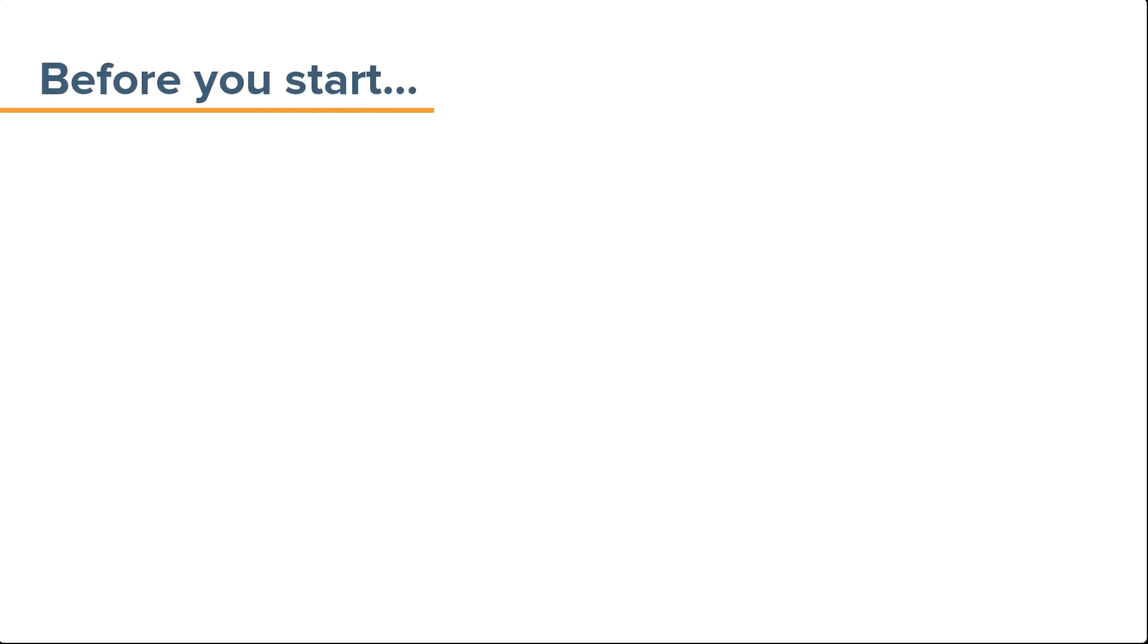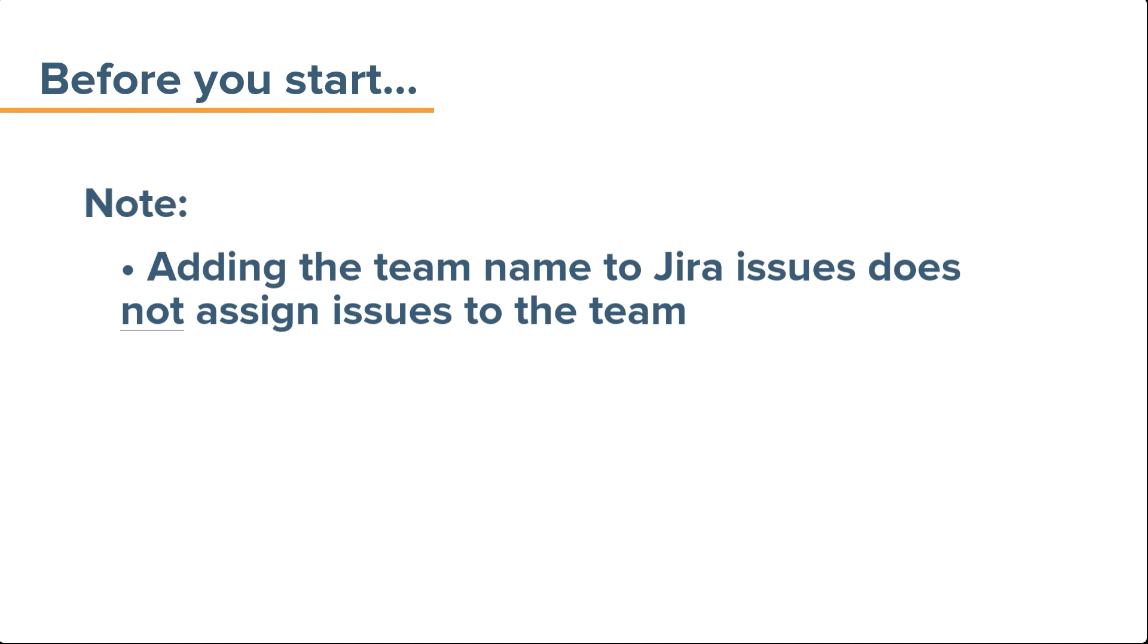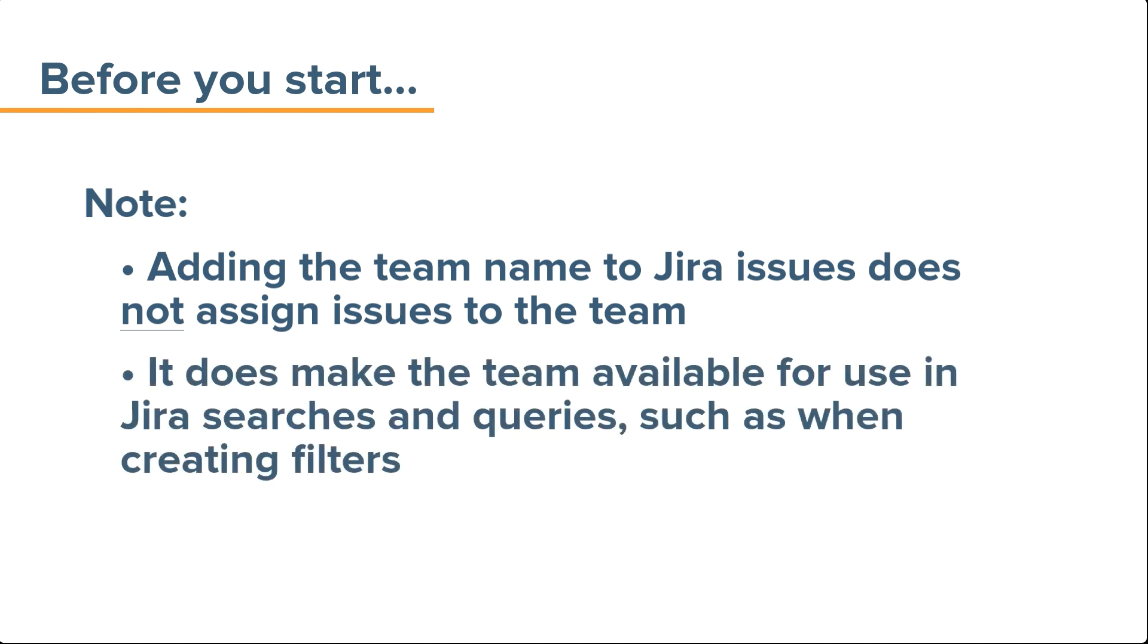Before we get started, it's important to note that adding your team's name to Jira issues doesn't assign those issues to the team, but it does make your team available in Jira searches and queries, such as when creating filters for your team's agile boards and backlog.